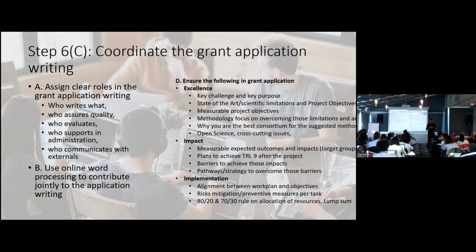So user needs, design, development, integration, pilot testing, and fine-tuning. These are the research and innovation activities. From the 20%, have a maximum of about 6% of the total budget go to project management, and the remaining 14% go to dissemination and exploitation. Is that high? Well, most projects require a lot of dissemination and communication activities, so it's always a good practice to have that kind of number.